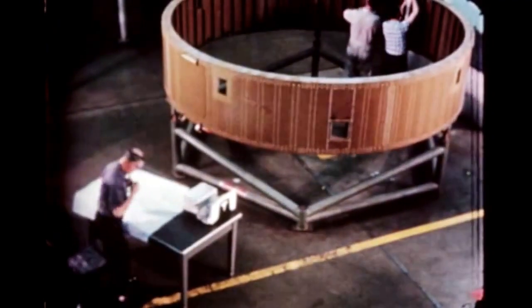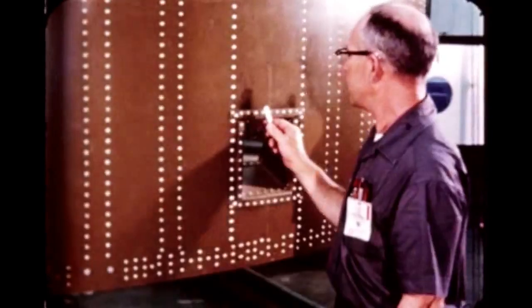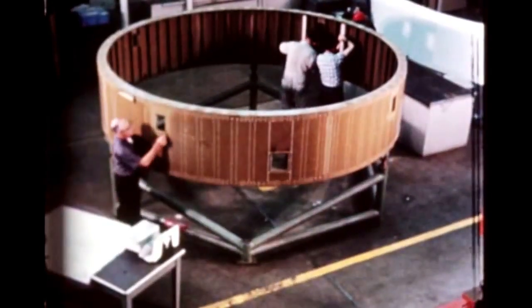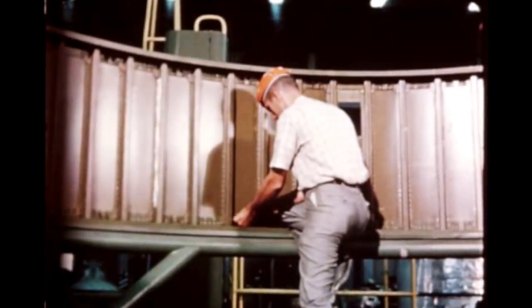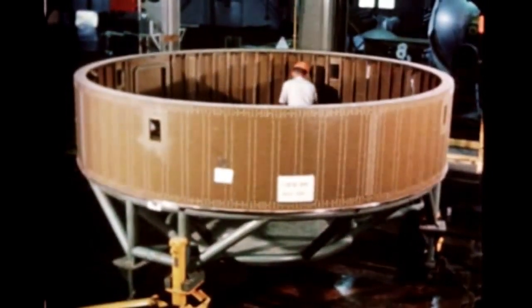Checkout of the instrument unit for the night flight vehicle SIU-8, located at Marshall's Quality and Reliability Assurance Laboratory, began October 28th and continued through December. Checkout of components is expected to continue as scheduled, with completion of tests due in January. Also at Marshall, SIU-10 component installation, begun last quarter, is continuing as scheduled.